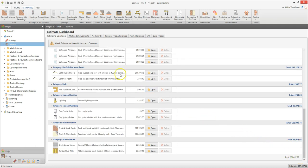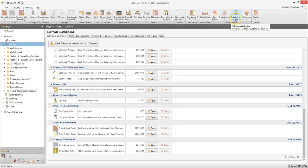From the estimate dashboard you can set your profit markup and adjustments, change your labour productivity profile, check the price allowances for your trusses, and round up plant allowances to whole days or weeks and set your VAT rate. From the estimating tab you can add to the estimate without adding to the drawing — you'll probably want to add site preliminaries and subcontract quotes here.